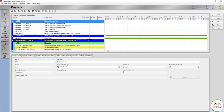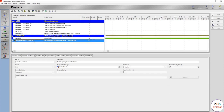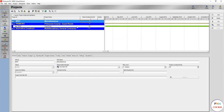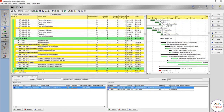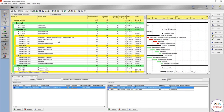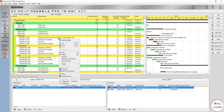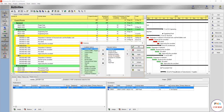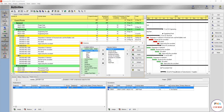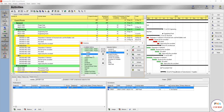Let's close everything and check the project. As you can see, it's only 54 activities — no need to overthink it. To see a better example, we'll focus on engineering and assign those activity codes. I usually prefer to add the columns first: right-click anywhere, go to Columns, find Activity Codes under the project, and you need the 'Engineering' column and the 'Submission' column.